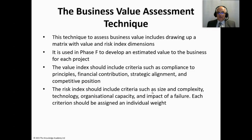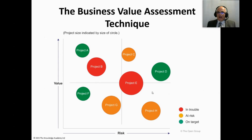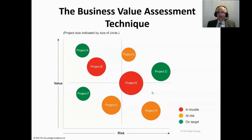The value index should include criteria such as compliance and principles, financial contribution, strategic alignment, and competitive position. The risk index should include criteria such as size, complexity, technology, organizational capacity, and impact of failure. Each criterion should be assigned an individual rate. There is an example in the TOGAF standard PDF, although it is very colourful. A RAG status is shown but seems out of place at this strategic planning level — it's far too early in the process to know whether a project is on target or at risk, and the standard doesn't explain why it's included.